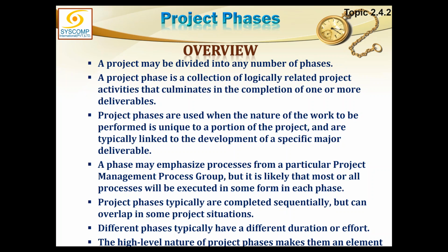So the overlap which is allowable is like, the first phase is in approvals and it is taking a lot of time. So maybe I can decide to start the next phase and take this much risk that this approval will not come. If it will not come, that will affect my second phase, which might have to be stopped.